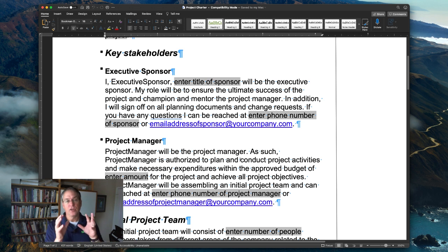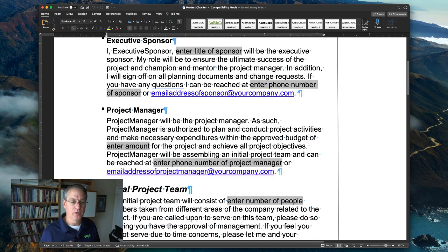So, the executive sponsor, who that person is, and what their title is. Notice, my role will be to ensure the ultimate success and mentor the project manager, who we're going to define later. I am the person who's going to sign off on all planning documents and change requests. So we are going to put a plan together at some point in the future, and I'm the one who's going to sign off on that, saying yes, the company agrees that this is what we're going to do. And if there's a change for any reason, I'm going to be the one to sign off on that as well. And here's where you can reach me. Yes, I know you can put this in CRM systems and all that, but I like to have it in one place, just my personal preference.